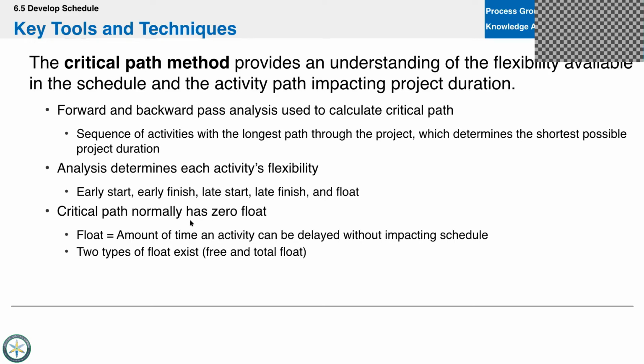Okay. Yeah. So CJ, on the construction side, sometimes we'll have contract documents that say, hey, you get a certain amount of days due to delay in weather. Okay. So would that be construed as float, because I'm extending the schedule due to something unforeseen, or how does that work? No, that's contingency. That's a contingency reserve.